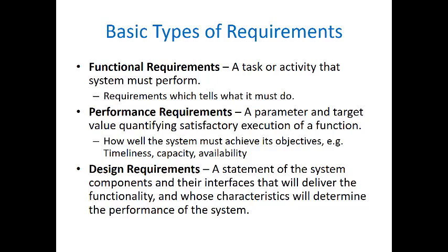For example, if the mayor of LA wants to build a bike rental system in LA, what would be some performance requirements? And as I said, what do you expect from this system when it's up and running? A couple of those requirements can be, we want 95% of our customers, when they get to a bike rental station, to find a bike.